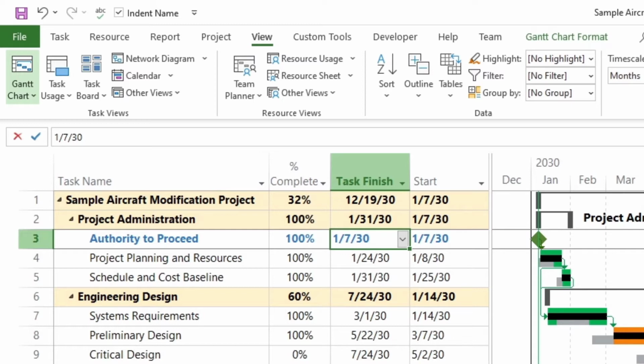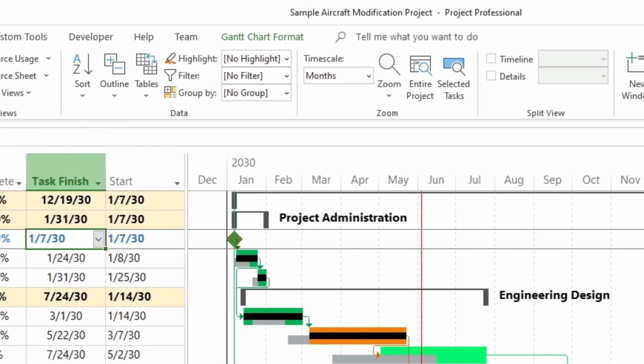To do this, it is better to modify the table being used for the view instead of dragging around the columns. Let's go look at the table that is being used. If you don't know how to access the table for the view, you can always use the search feature in Microsoft Project. Type tables and it will take you there.